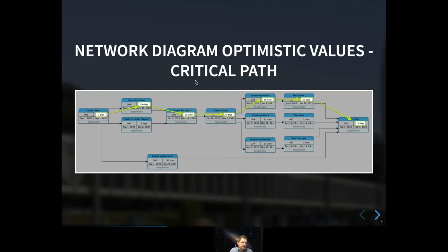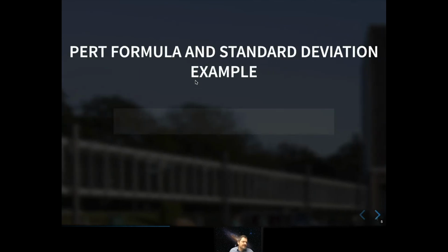But the question is, you have no buffer planned in here, obviously. So you did not consider any other estimation technique. And here it can and it will help if you use a PERT estimation. So you have a look at these 3-point estimations, and there's a formula which you can use. This formula is generally based on the modified beta distribution, so it's simplified in project management. In the books, you always find this simplified formula for PERT and for the standard deviation. You'll see it in a minute.